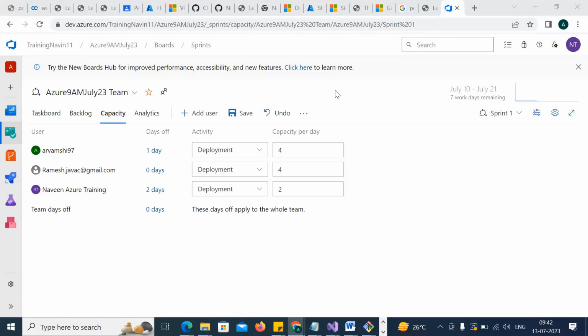planning in the meeting of sprint planning. We will plan a meeting on the very first day of the sprint, right? That is called sprint planning. Basically, we are trying to figure out how many tasks we can keep for this sprint. On what basis can we keep them? On the basis of our availability for the sprint. How many hours I am available.